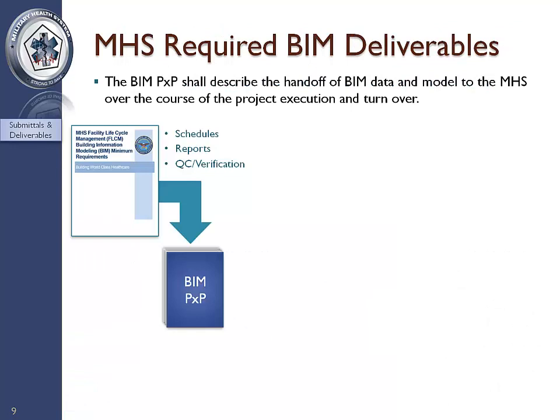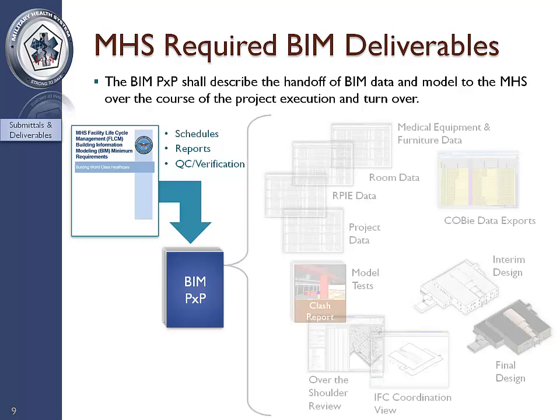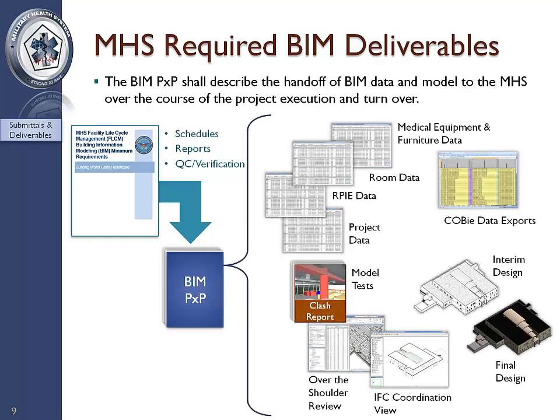The MHS BIM minimum requirements serve as a guide for required BIM submittals that must be included in the PXP. These submittals include schedules, reports, and verification of model compliance with MHS requirements and are required to be in technology formats that are well known and accessible to the design and construction agents, such as Excel spreadsheets.